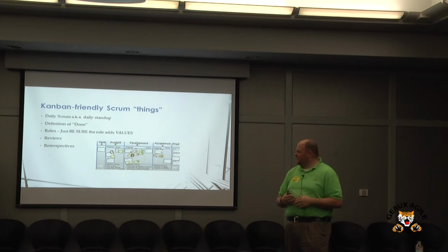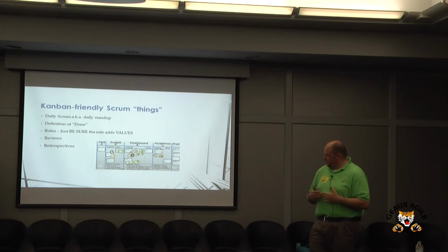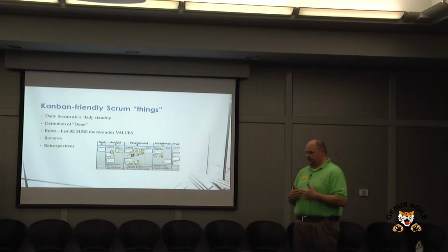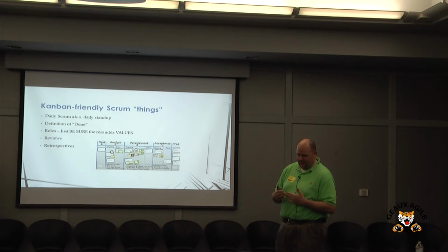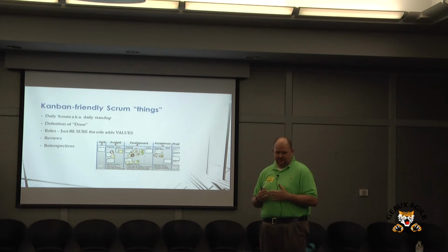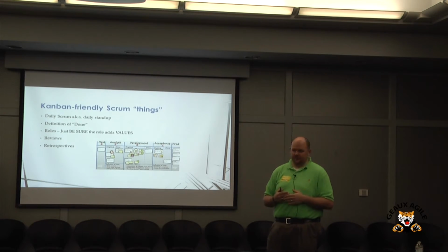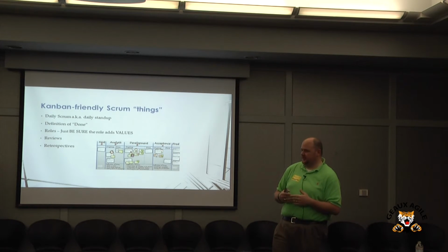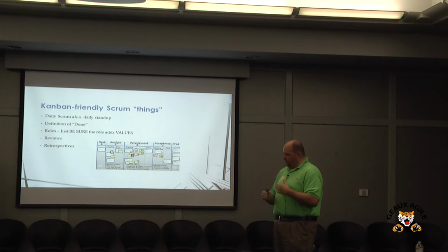Every 5 minutes. The last thing I would recommend for Kanban teams is definitely retrospectives, kind of like the way we do them in Scrum. You don't have to wait every 2 weeks. They don't have to be 2 hours or 1 hour. You can do them once a week, once a day for 10 minutes. It's up to you. Your team's going to always inspect and adapt and figure it out.